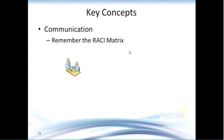I'm referring here to the RACI matrix. For those of you who were on previous sessions, you may remember I talked about RACI, which stands for Responsible, Accountable, Consulted, and Informed. It's often helpful to identify, for any given activity within the IT processes, who ultimately is accountable for the process — and you should only have one person who's accountable — then who is responsible for the activities, who should be consulted, and who should be informed.